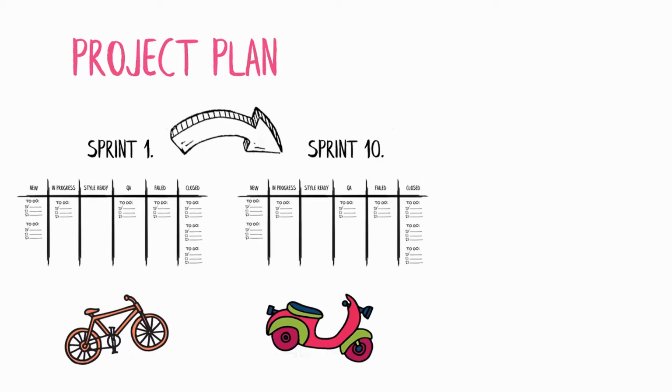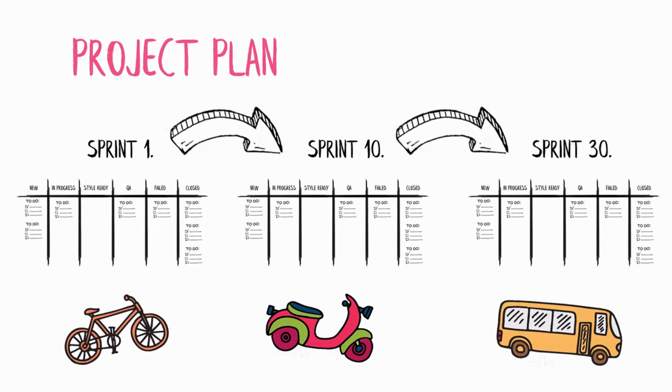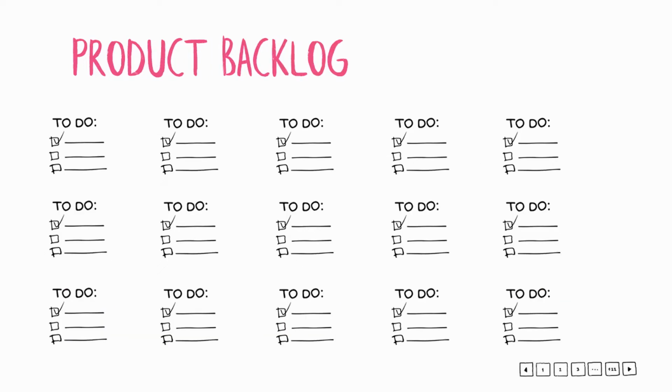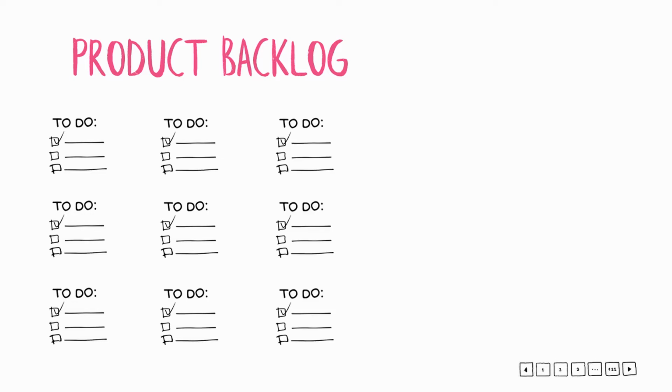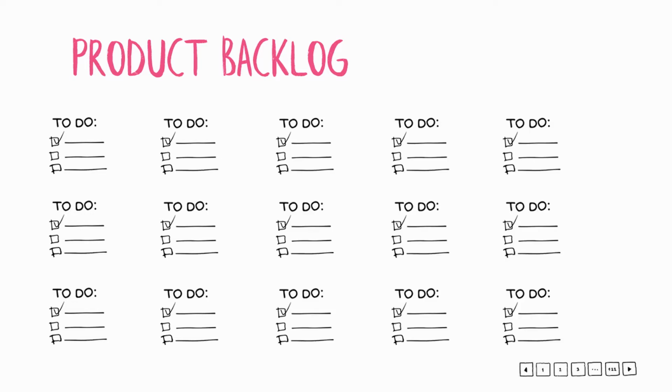And after that, we're getting the feedback from the clients. And after that, we're building whatever they want and desire the most. So we're creating our product based upon the feedback from the client. The product backlog is getting smaller and smaller with initial items, but this doesn't mean that we are not adding new items to the product backlog that will be input for the future sprints. So as long as the client is interested in using our product features, the product will be built.